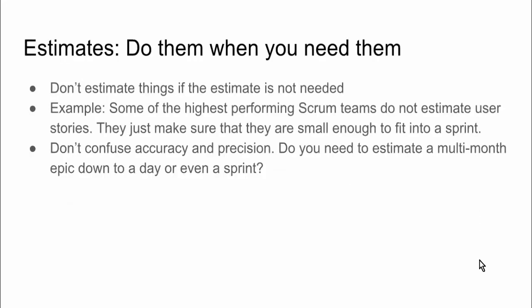Let's turn now to estimates. The top level comment I want to make is that you shouldn't worry about estimates when they're not providing value. I see lots of Scrum teams spending an enormous amount of time estimating PBIs and user stories. My suggestion is to time box all estimates and simply pick a number and proceed. Don't let your team get stuck on estimation.